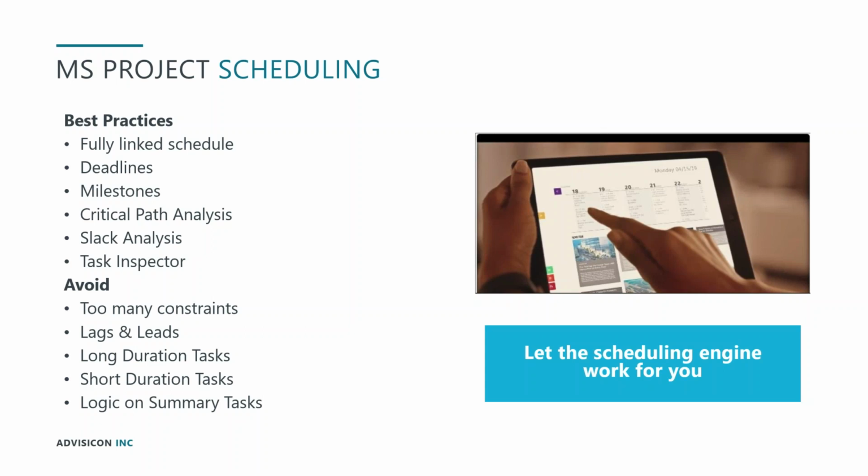If it doesn't really matter in which order tasks are performed, or during what time of day a task is performed, I prefer to have the shortest duration that I plan for being a full day. And then when I assign the resources to that task, I assign them at a percentage of their maximum units or their capacity, so that the actual work being done is spread throughout the day.